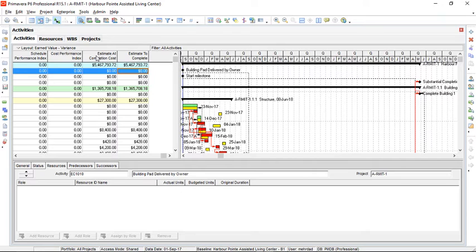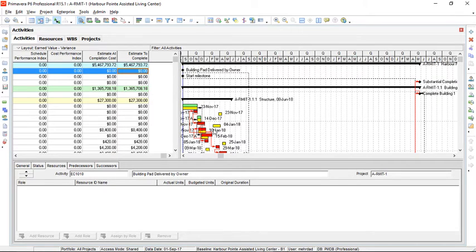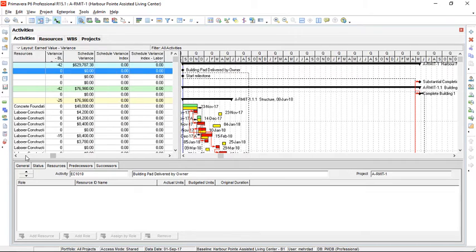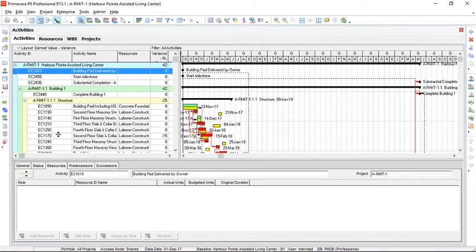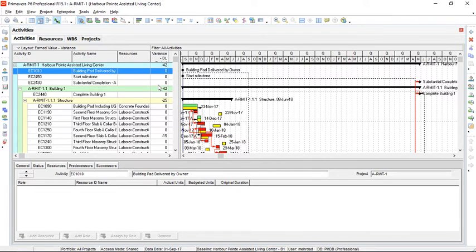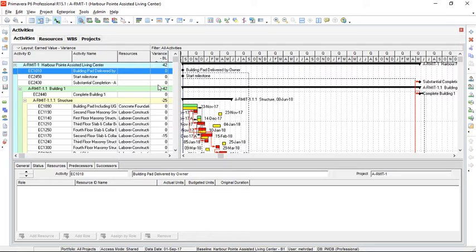As you can see, the baseline is not aligned with some activities because of delays and the negative values we have for variances are indicators of deviations or slippage from project plan. We need to select some activities and add overtime or resources to them in order to fast track the project and bring it back to the plan.